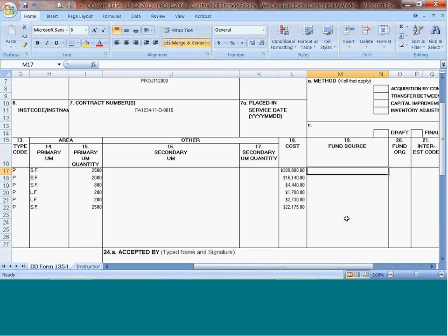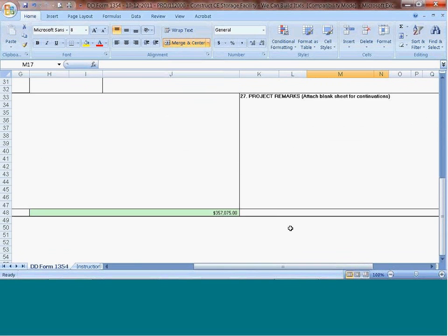If you don't identify every single dollar that's being spent there, when BRAC comes around, they want to close you down. Yeah. What real property does is it makes sure that this entire amount of money right here gets put back in the value of that base. And while it might not seem like $357,000 is a lot of money, multiply that times about 20 or 30 projects in about 4 or 5 years. That starts to add up really, really quick.